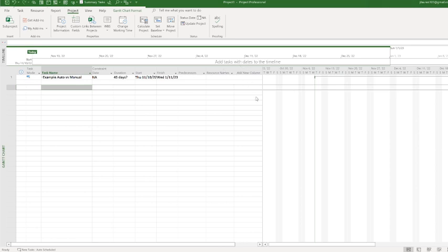So we're going to go with 2023 since that's next year. So we're going to pretend like we're going to start this project next year. Now, we'll just do it for the year only. So I base the calendar off the government holiday calendar. And that's just because I want to make sure that if I'm dealing with government officials, for example, as a client, there are days that they will not be working, right? And we can kind of acknowledge that.